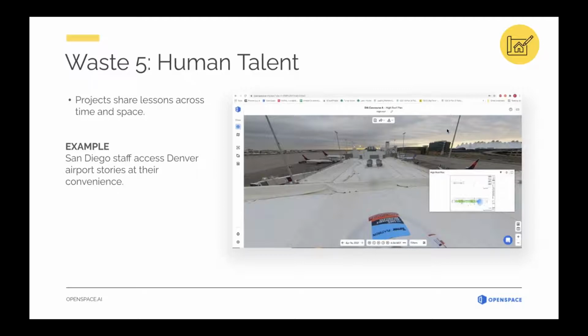And so we connected with those guys and wanted to share some of the things that we'd learned because the other one of my favorite things is pre-construction, and just the idea that a unit's worth of effort in pre-construction is worth 3 units of effort once you get going and get in construction. So we wanted to really share some of what we'd learned here with those guys. We're starting a project of similar scope as ours, similar design.